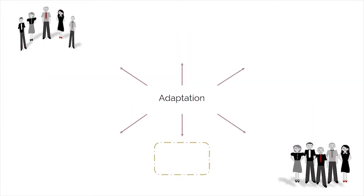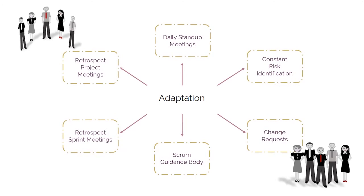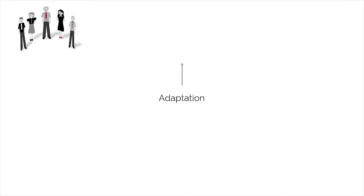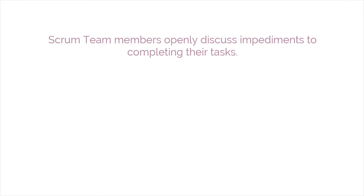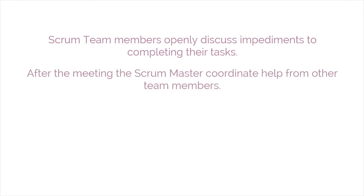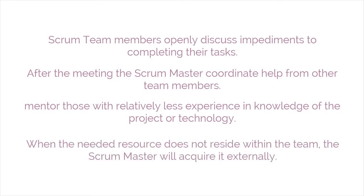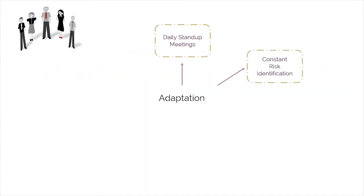The third main characteristic of empirical process control is adaptation. Adaptation happens as the Scrum core team and stakeholders learn through transparency and inspection and then adapt by making improvements in the work they're doing. Some examples of adaptation include: in daily stand-up meetings, Scrum team members openly discuss impediments to completing their tasks. After the meeting, the Scrum master coordinates help from other team members. More experienced members also mentor those with relatively less experience and knowledge of the project or technology. When the needed resource doesn't reside within the team, the Scrum master will acquire it externally.